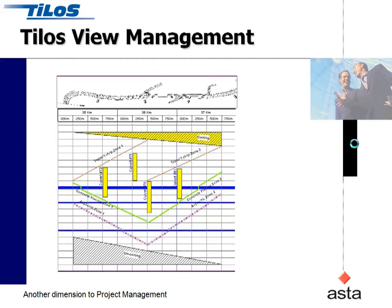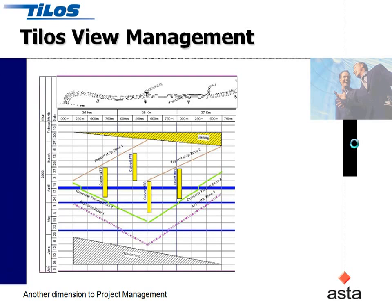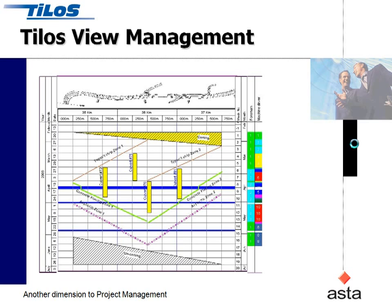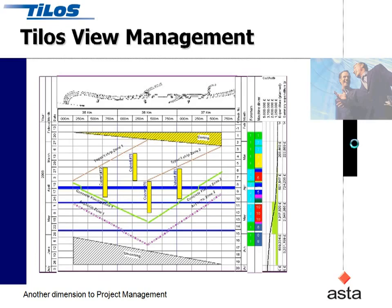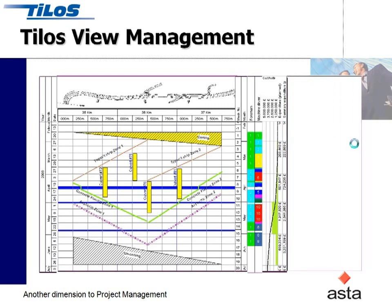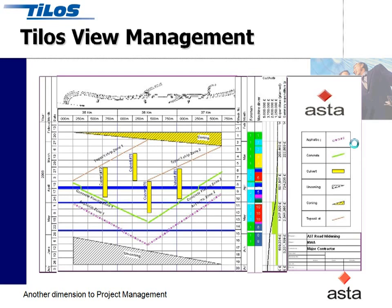We can put a map or a number of maps of the project at any point. We can put a time ruler in another cell on the left-hand side and say how many columns it should have, and possibly a different one on the right-hand side. If the project has resources, we can map those in various graphs. If there are costs, we can map those costs in various graphs, so we can see the cash flow and resource usage. We can surround the view with a border and expose any side of that. We can embed a title block and include logos and legends.